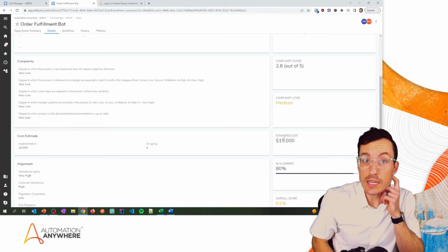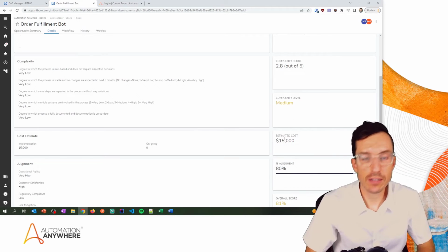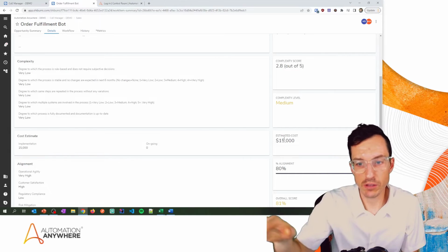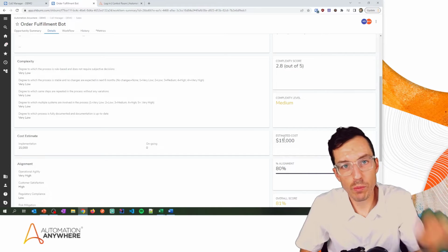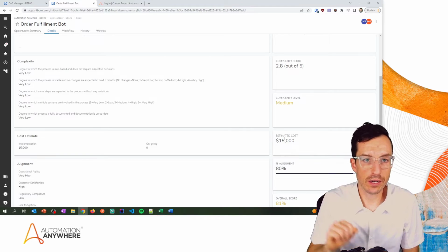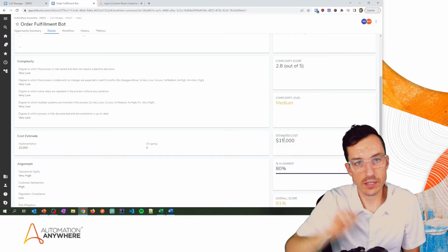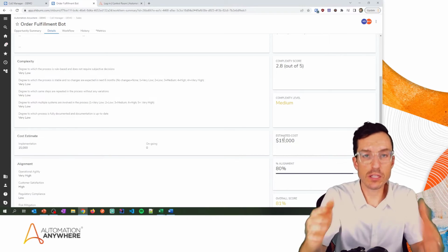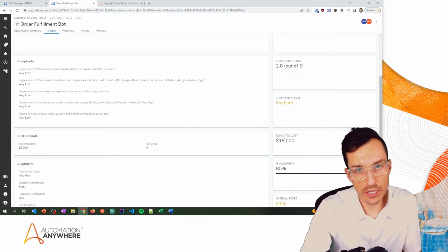And what you can see is that if you're doing, let's say you're doing agile development and you're used to saying that, like, oh, this is a small t-shirt size, this is a medium t-shirt size, this is a large t-shirt size, and a low takes us, let's say, 4 weeks for development and $10,000. A medium takes us 6-week development and $15,000. And a large takes us $30,000 and 10 weeks to develop. That's what this is doing here, trying to automatically estimate the cost for you based on the complexity level.